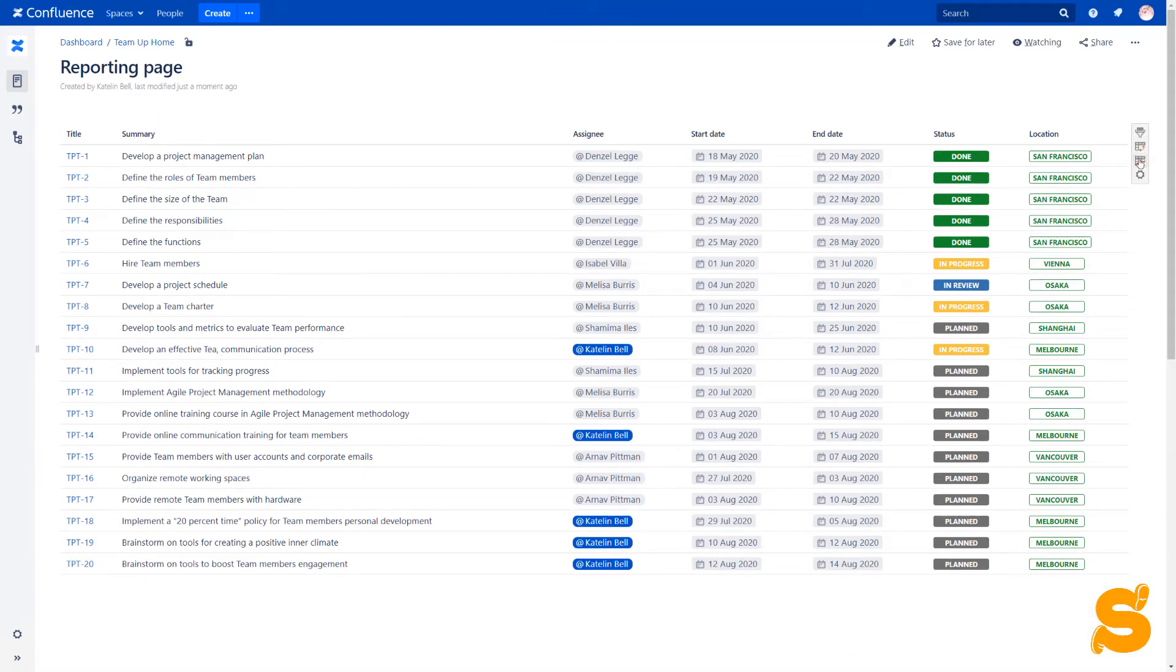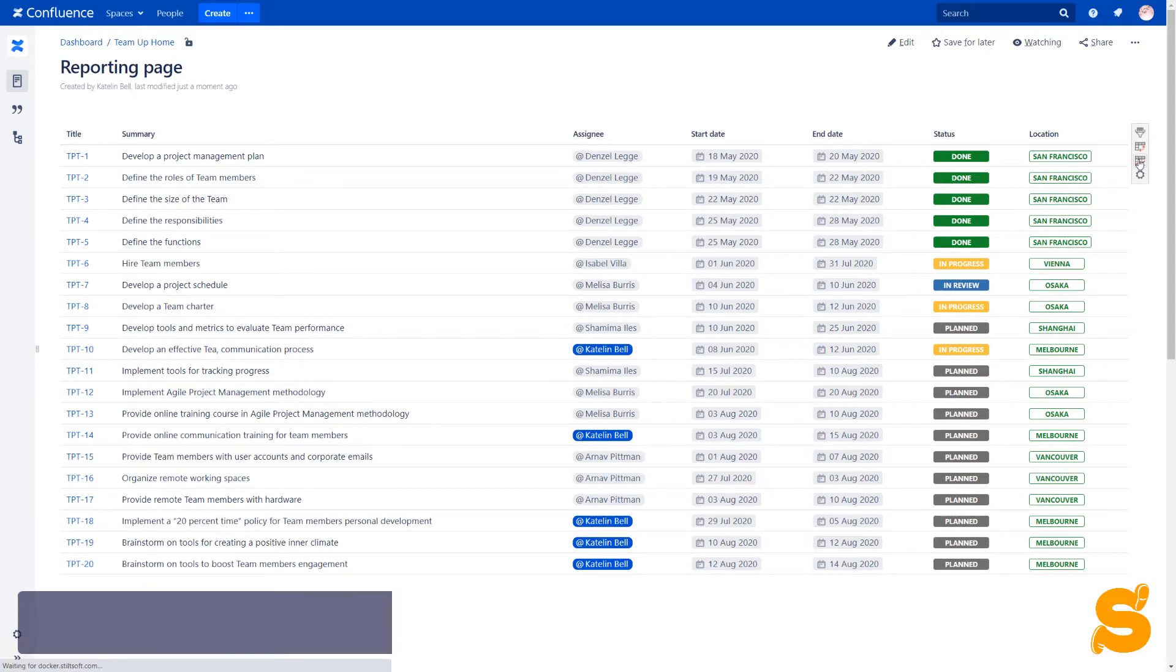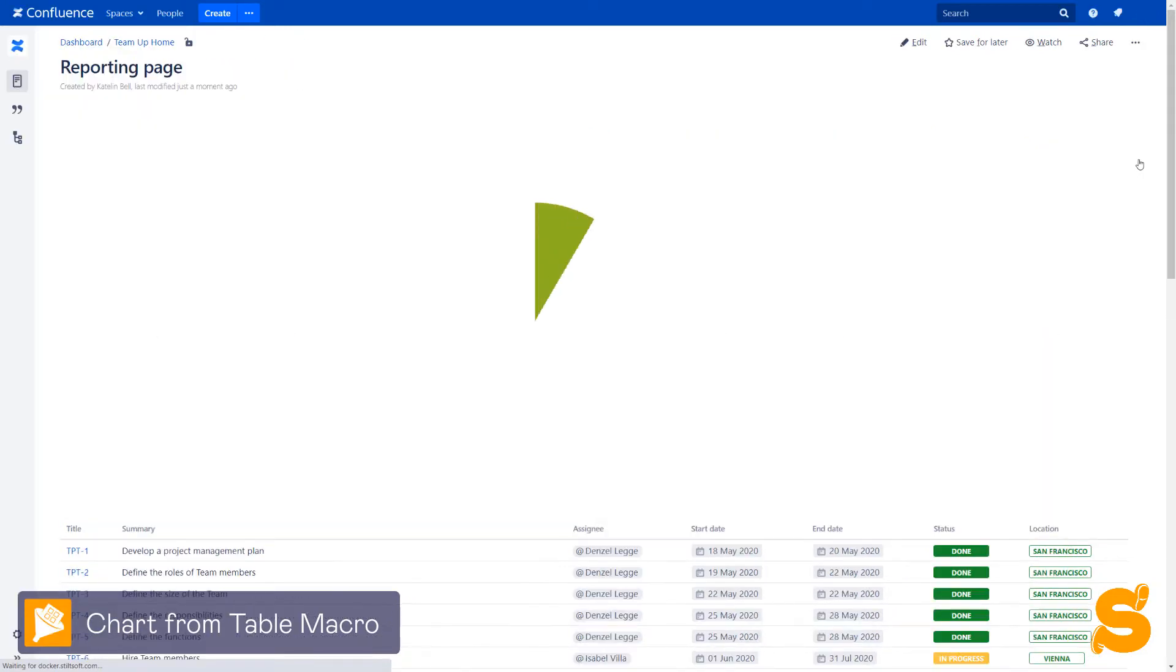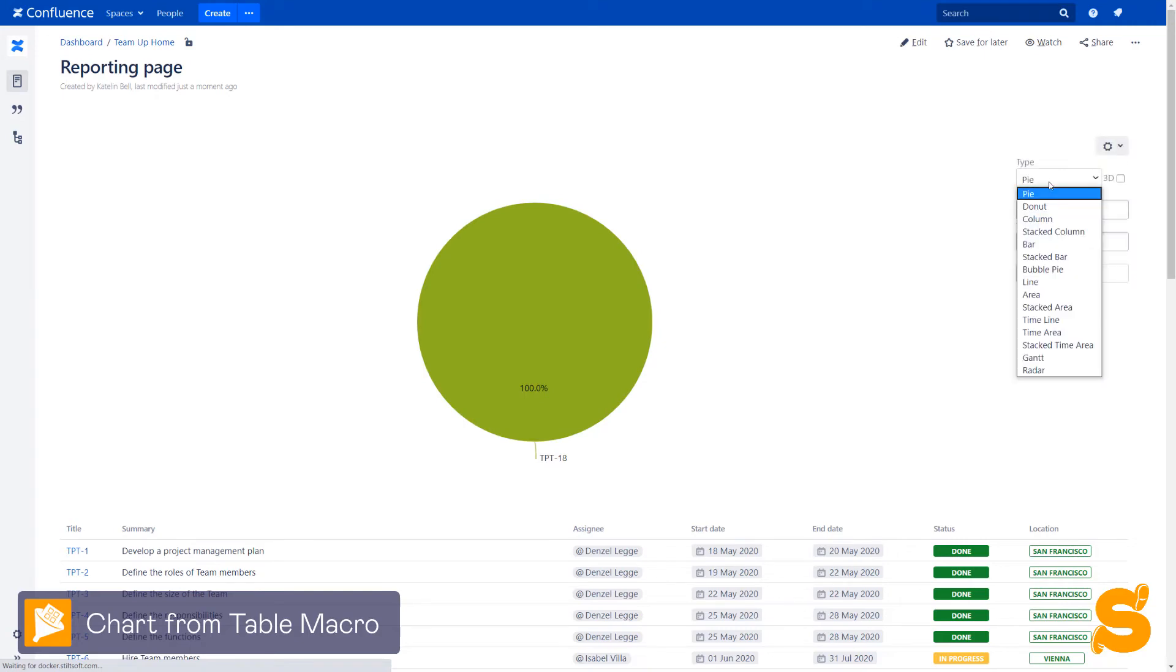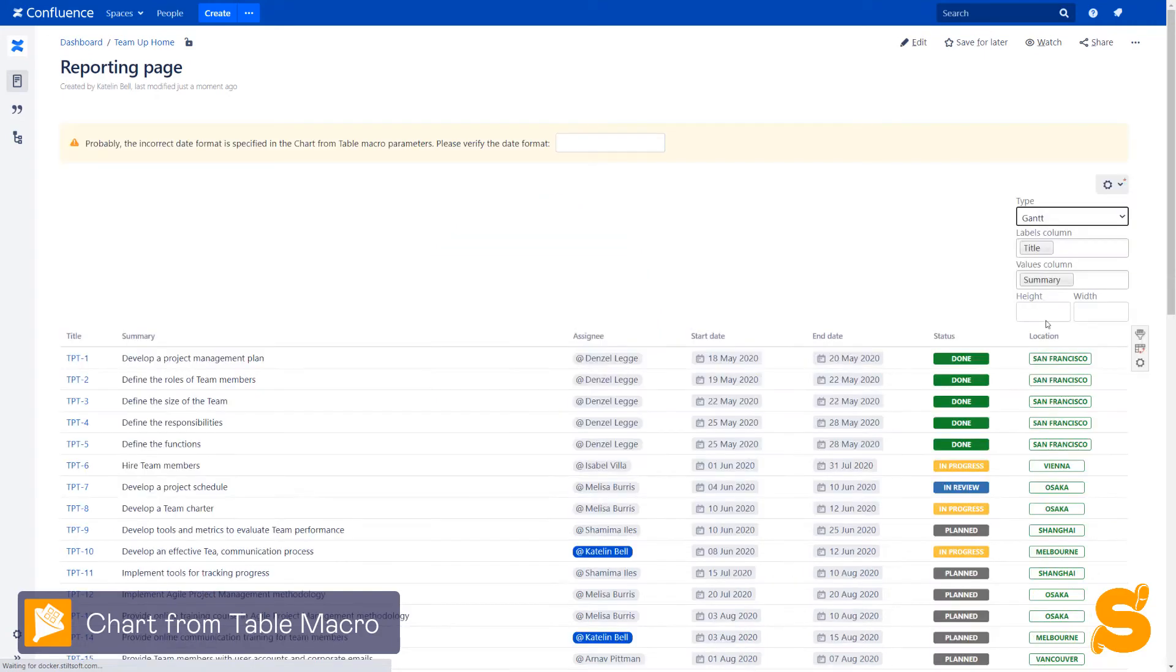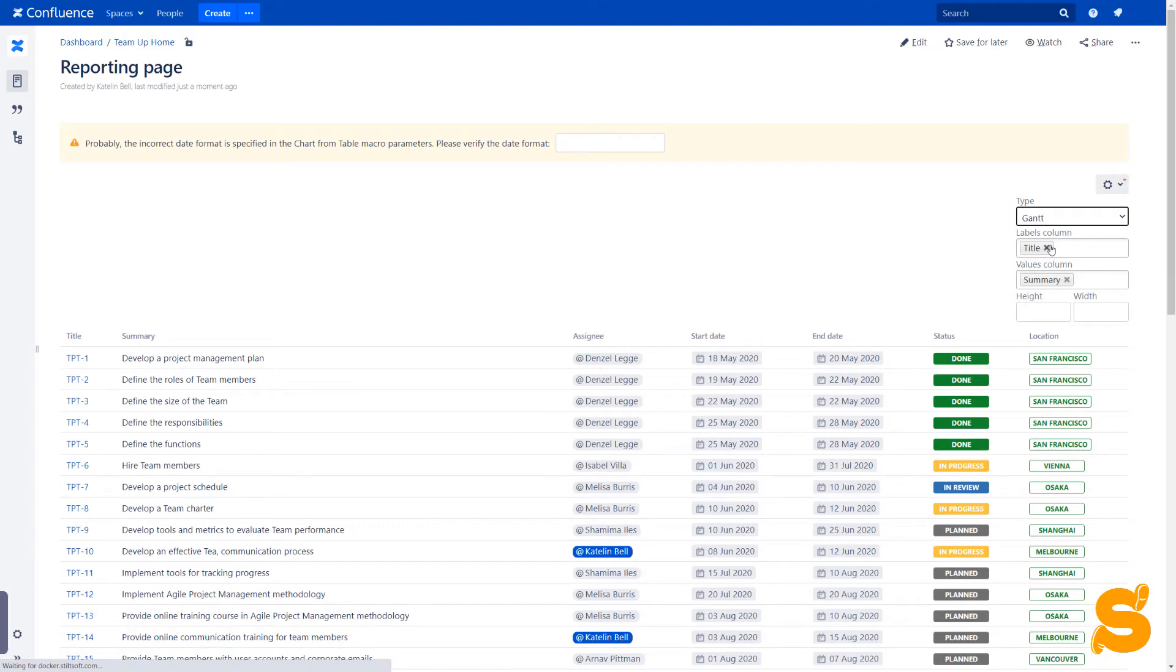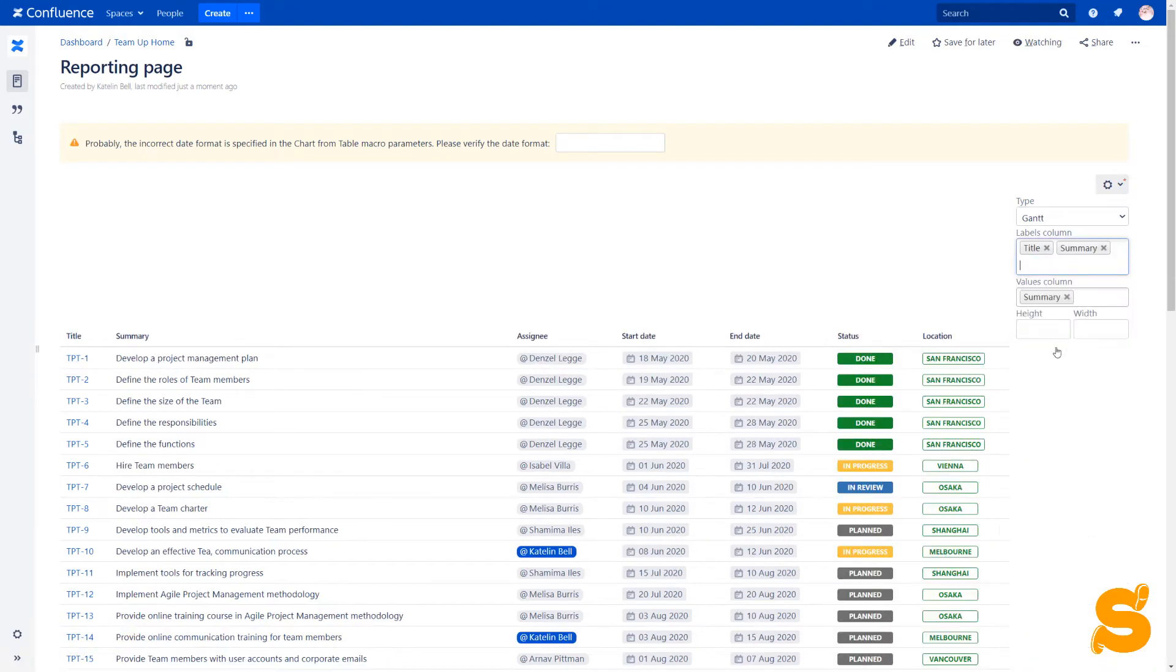With the help of the Table filtering charts app, we can create a Gantt chart on the go. To build the simplest chart, we need at least one labels column and two columns with dates: start date and end date.